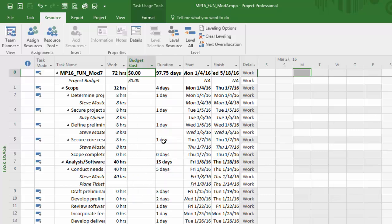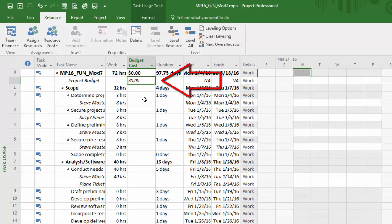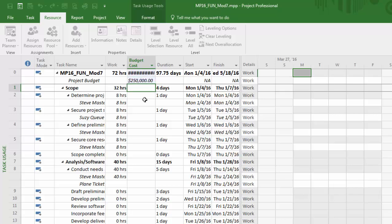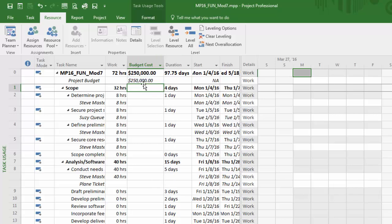Now within my task usage view with the project budget assigned to the project summary task, in that cell I can now type in that value: a $250,000 budget for this particular project. That will follow this project as you compare it to cost and other attributes, and you can always adjust that number as you work with the project.